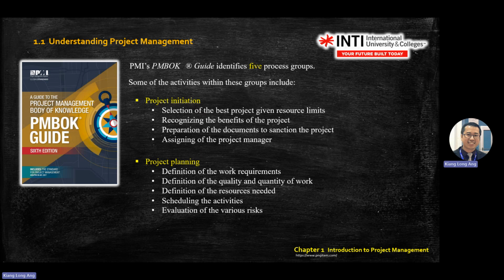First one is 100%, no need for any changes, just proceed to the next phase. Third one is on hold and request for more information. Means do not proceed, stop the project, on hold and request for information for further decision. Means you need to gather information and then make a decision. Okay, it can be reversed back. So once you gather information, it can either go proceed with alteration, or the last one, cancel the project. The last one is no go, means red light, stop the project.